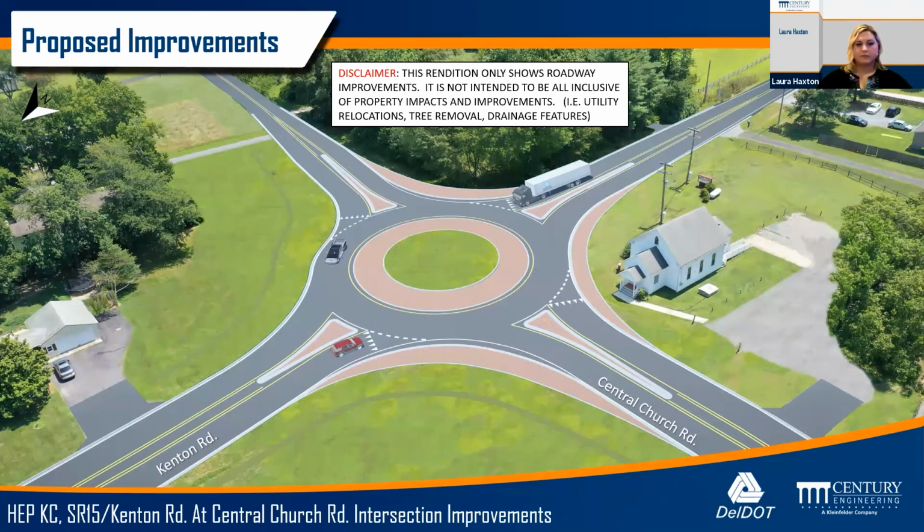And it looks like this is a right-of-way question. I live in the project limits. How will DelDOT acquire the necessary land they need for the project? Hi, I'm Rosemary Richardson. I'm the acquisitions manager. And basically we were provided with the plans, and the plans have an acquisition area for your property. It may be in fee, it might be a permanent easement, or it might be a temporary construction easement. So it's based on what the needs are of the project.